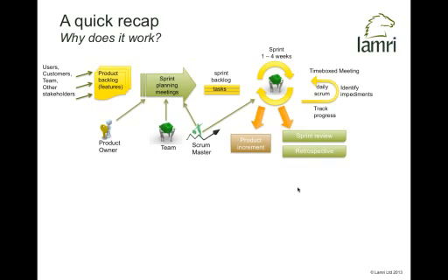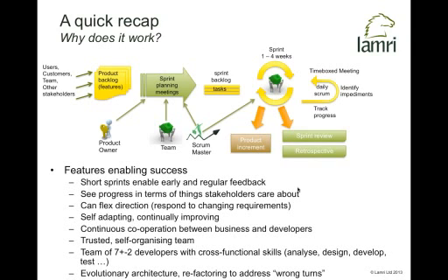And also, there's the retrospective, that opportunity to feed back and learn what went well, what didn't go so well, what can we change, what can we do better next time. And I guess one of the key things here is the old how do you eat an elephant syndrome: not in one great lump, but just a bite at a time. And that's to a certain extent what we're doing with Agile. We're breaking down the whole big problem of delivering a potentially quite large, novel system into tiny little chunks, which we can address chunk by chunk by chunk.